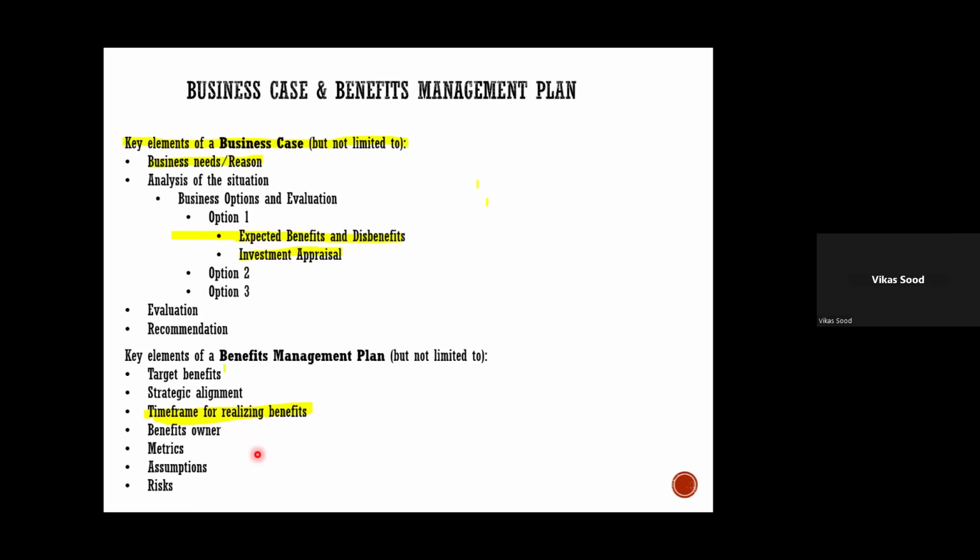As you said, after we draw a timeline, we said after 6 months, 5 million, and after a further 6 months, 8 million. So those values are the metrics, whatever measurements will happen, against which we'll be measuring our benefits. These are the key performance indicators, KPIs. Because apart from financial, there can be some non-financial benefits also, so KPIs should cover all of them.